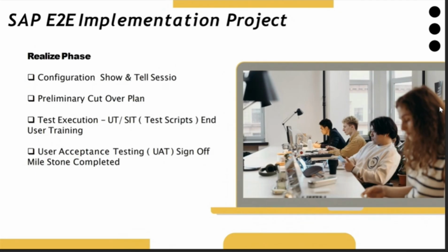You have to record these. You have to prepare the integration test scripts based on these. Now each module consultant has to execute, then make sure that your process is executed successfully. I'm telling you one process. Like that, 30 processes, 40 processes, every module's integration testing will be involved. Clear?